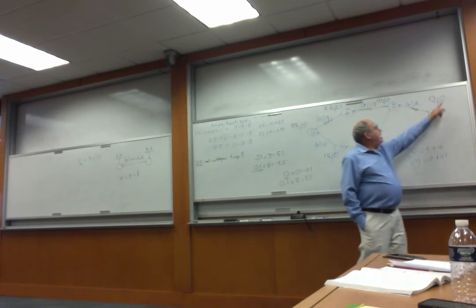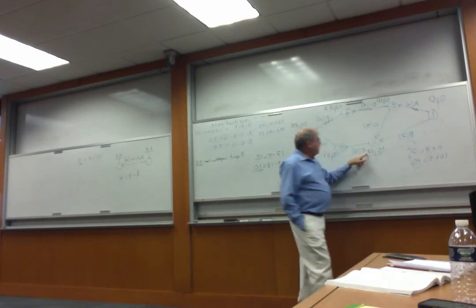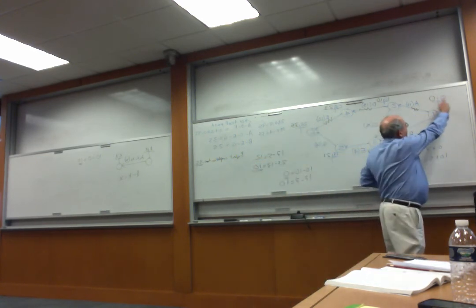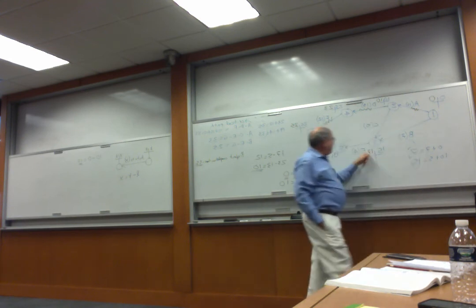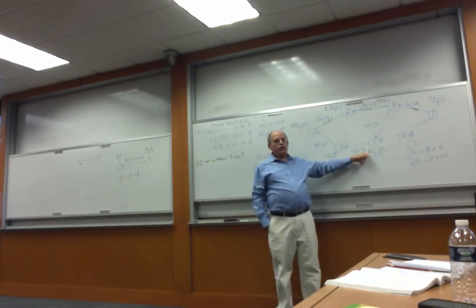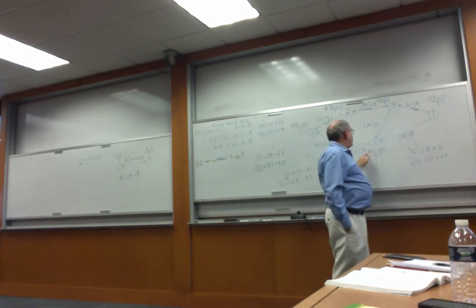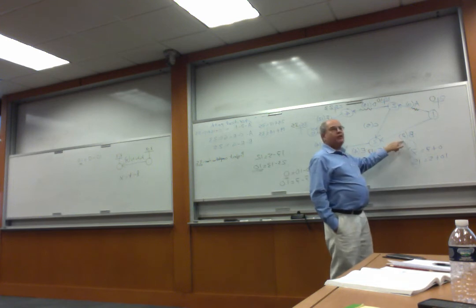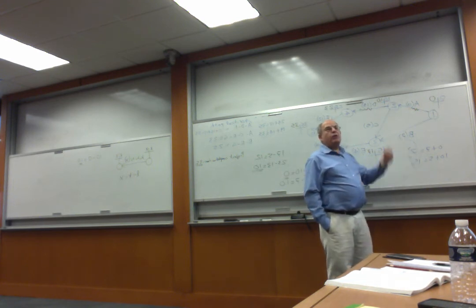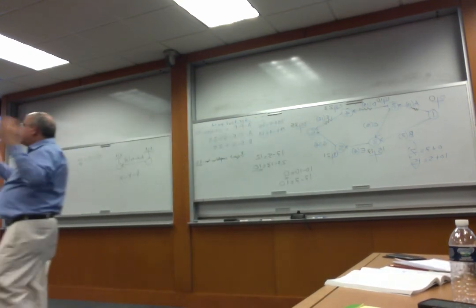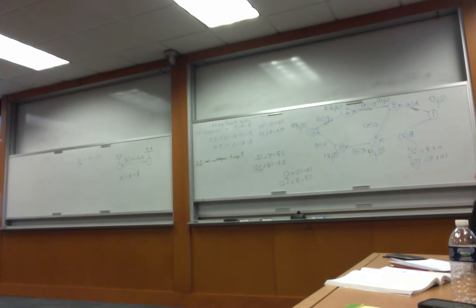When is the earliest we can start it? 0. When is the latest we can finish it? 17. So the earliest we can start it is the value on the left here, 0. The latest we can finish it is that 17 down there. Look at how much leeway we have with B. From 0 to 17 is 17 time units. But the actual length of B is only 7. So now we quantify how much slack we have. We have a time window from 0 to 17, but it actually takes only 7 time units, so we have a cushion of 10 time units.